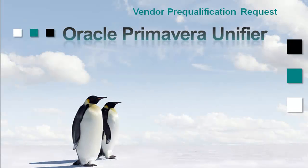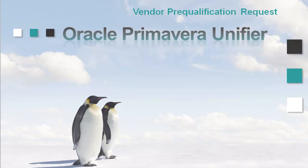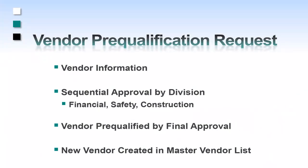Primavera Unifier utilizes the vendor prequalification request to prequalify vendors before they are added to the master vendor list. To utilize this business process, we first have to enter the vendor information, then send this for a sequential approval by each of the divisions within the company — in this example, the financial, safety, and construction divisions. We then prequalify the vendor with the final approval stage, and if they meet all requirements, a new vendor will be created in the master vendor list.